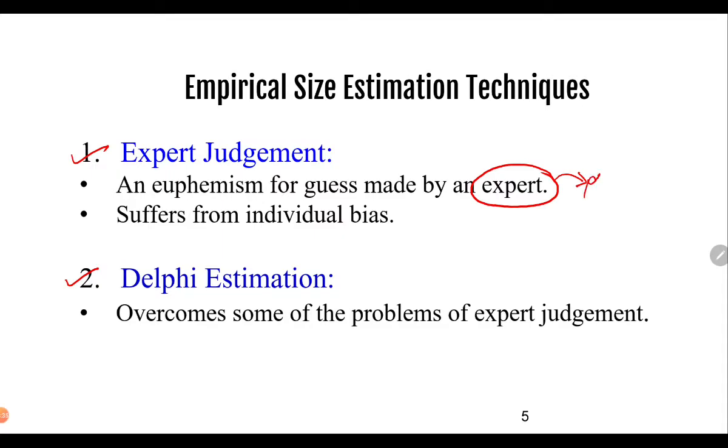in order to plan it, and he does it based on his educated guess that he gets from an experience or a real-time implementation experience. So this educated guess is generally 80 to 90% correct because it is dependent upon experience. However, sometimes it happens that since it is done by an expert and it does not follow any methodology, it definitely suffers from individual biasness.